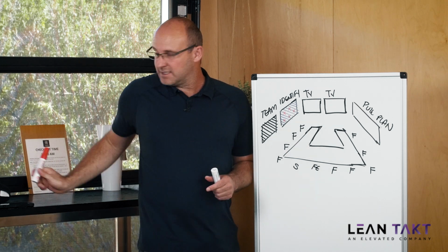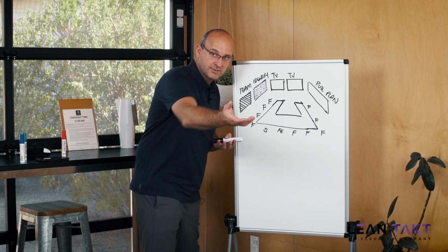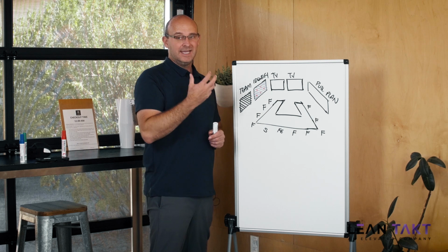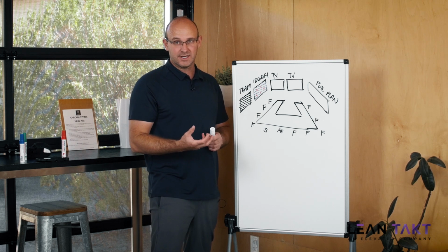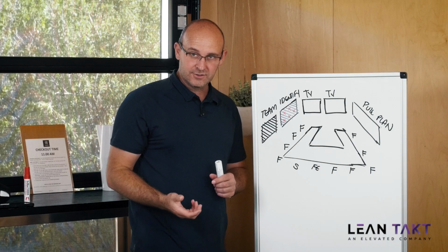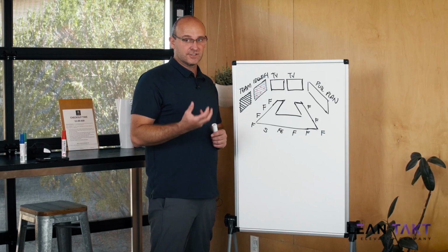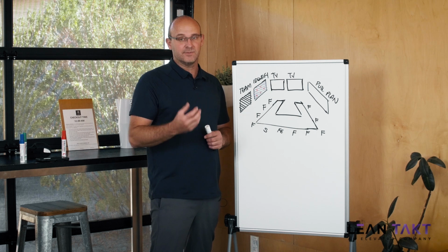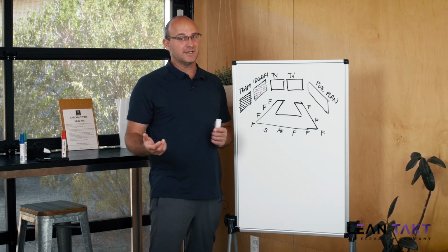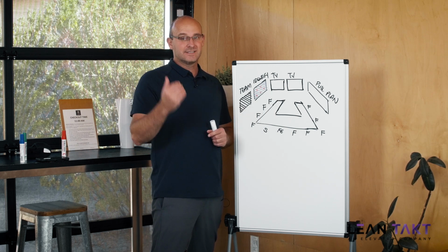Now, constraints, like I've talked to you about before, are things that constrain the system. Either the zones or the train tracks or the train of trades. Anything that's a part of the system design, how many zones we have, how the zones are configured, how the trade partners are packaged, crew sizes, those types of things, those are constraints. They're constraining the system. You can't eliminate takt wagons, you can't eliminate zones, you can't eliminate the number of zones that are within the proper range. You just can simply adjust them.